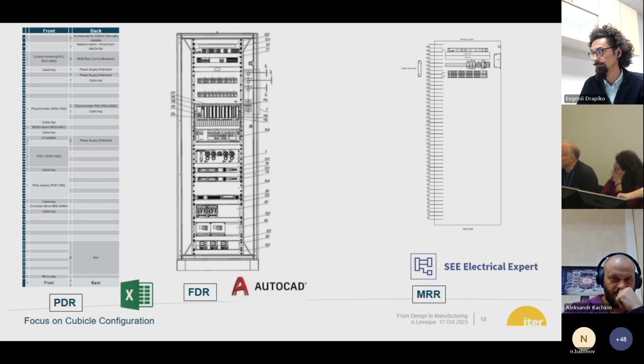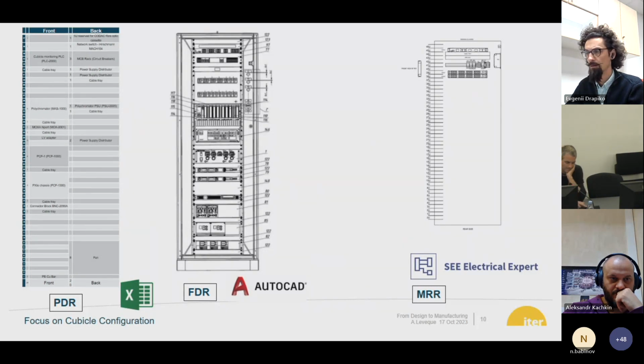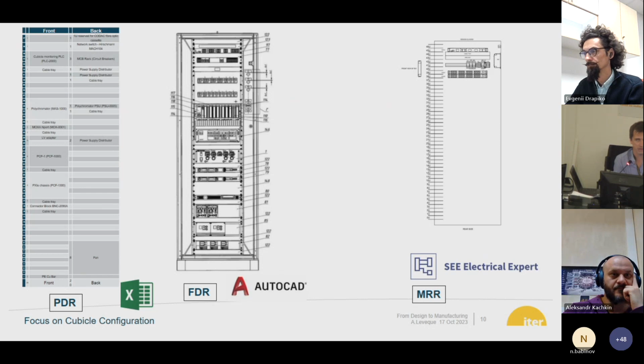That's an ITER problem. Yeah. So we'll have a lot of these issues, but clearly you will see tomorrow all the BPs are installed in a specific configuration. They have a lot of spare, so it will not be in a dramatic situation, but everything will go through a change process. You will ask NX0, I have a new client, which is my optical table. I need to check if there is really a reason why only a cubicle should be put. I don't see any reason.